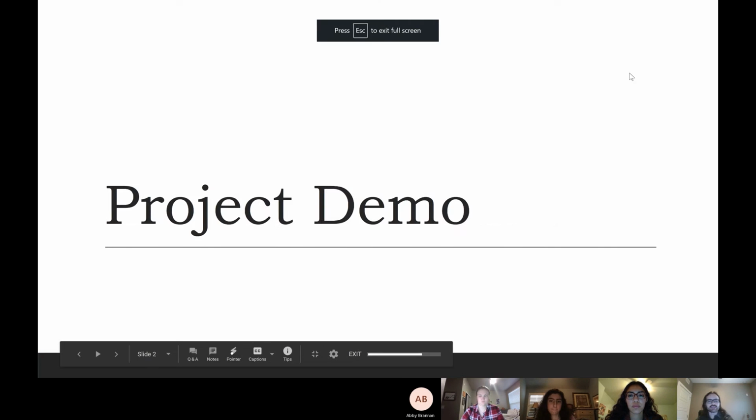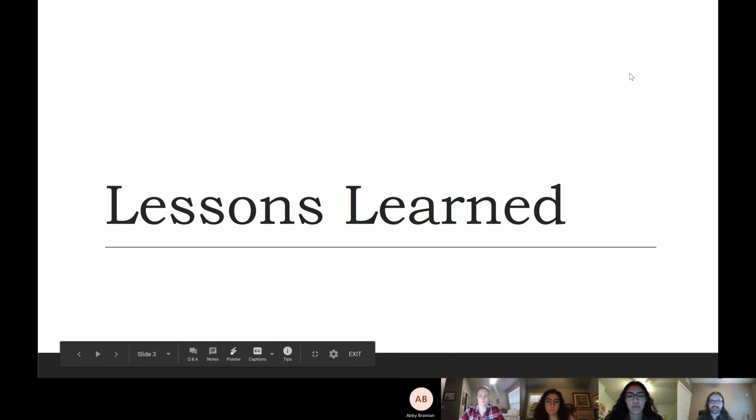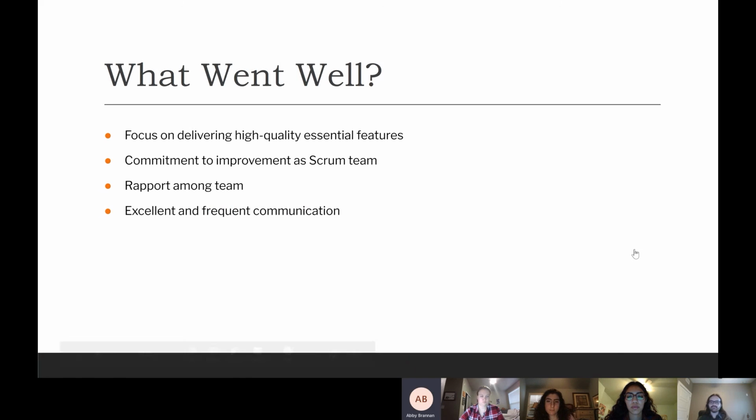So we'll move on to the lessons learned, and I'll let my team answer these. One of the factors that contributed to our success was our focus on delivering high quality essential features. High quality to us meant the features worked, they were highly usable, and they were highly secure. Essential meaning we prioritized the features that were most important to the client and made sure to do those first, and other features afterwards. This helped us to deliver very high quality features that were important to the client.